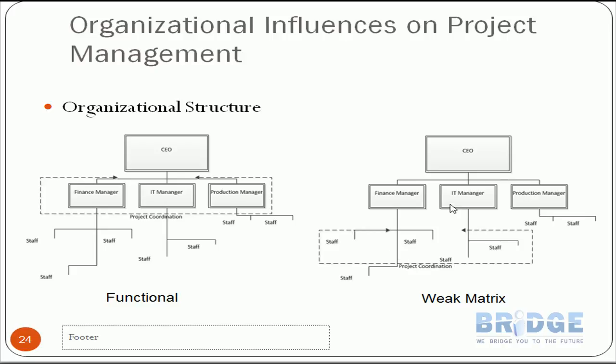It's more suitable than the functional structure, but we call it the 'weak' matrix because the coordinator is not empowered enough. The staff now reports to two people: their functional manager and the project coordinator or expediter. There is a distinction: a project coordinator has some authority to make decisions, while a project expediter has no authority at all — only following up on tasks.